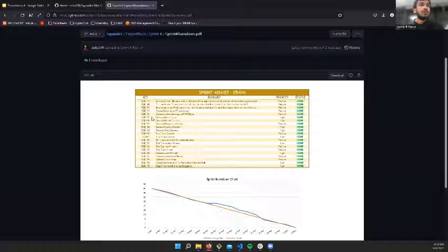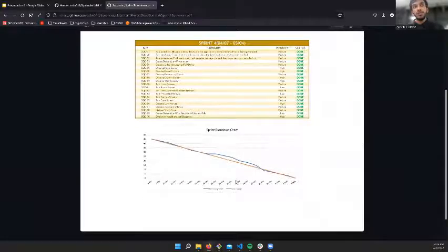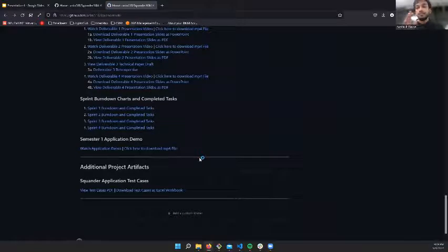So we have the keys for the task written out in here, and then we have a short description. We have the title of the story. We also are mentioning the priority and the completion of it. So right here, you'd see how the time was committed as the sprint progressed, and this is a really good progress by the team. The burn down chart had a similar slope as to that of the expected slope.